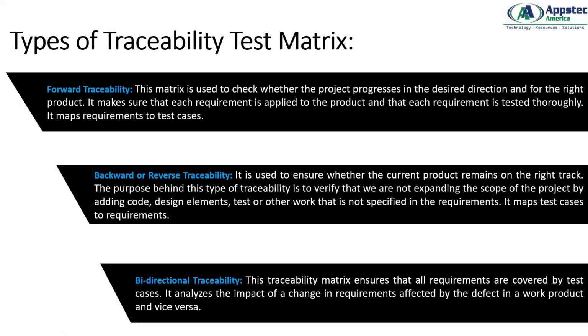The importance of segregating the work is to cover up the time. If your project's deadline is very near, it's very tough for one individual to develop. That's why a project manager might add additional hands to complete the task, but he has to ensure that the traceability of the project is taken care of, because 4 developers might mess things up as well. That's where your traceability becomes very, very important.